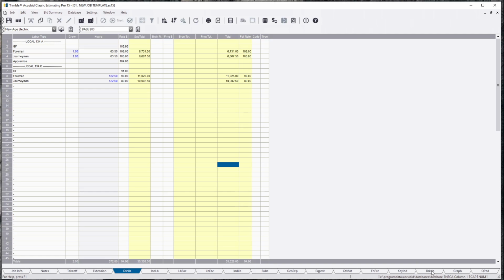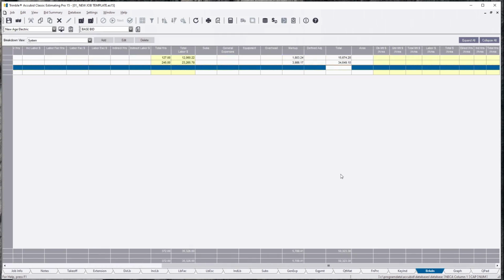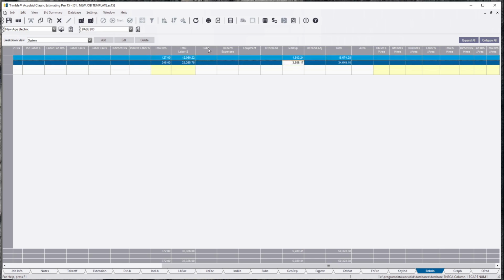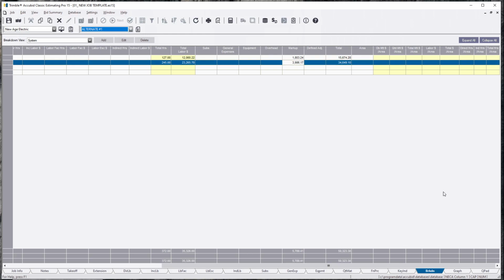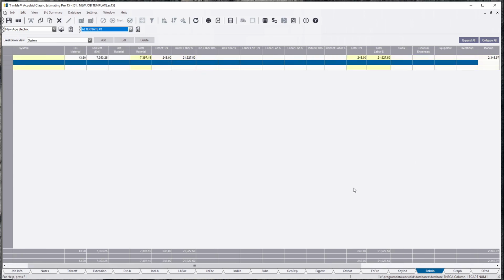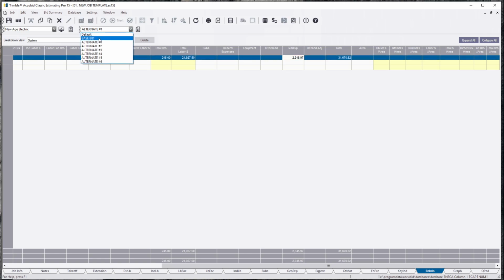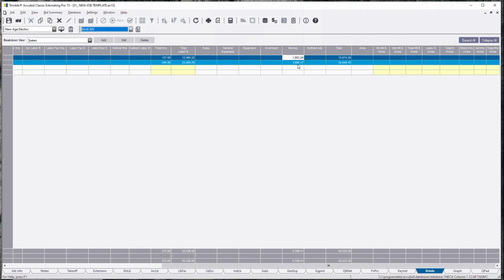So like I was saying before, if you do the deduct on here, you're giving back almost $4,000. Or in reality, if you used it this way and you were a little more aggressive, and then unfortunately the owner didn't want to use you guys, you're only giving back $2,300 versus the almost $4,000 back. So really, you don't even want the job anymore. It's kind of not even worth it. But hey, it's the business.